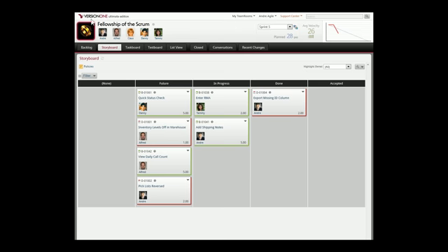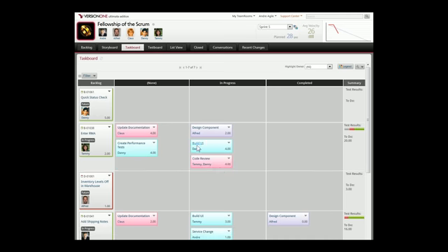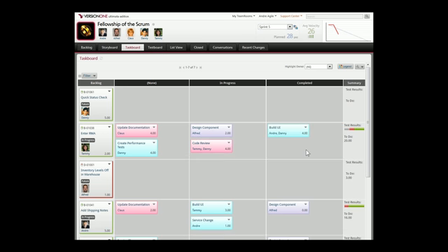So in this Team Room, I'm looking at a Scrum team. We can see at the top all the members in that team. I also can quickly see my task board. Similar to what Mike showed, you have a row here for each story or defect, and then the columns represent the different task statuses. If I'm going to work on an item, I can just start dragging the item around. If I was going to work on building this UI with Danny, maybe pair up with him, I can sign myself up for that task. We can track our work, entering the time we've spent and the remaining amount to do, and at least showing progress and what we're working on at any time.